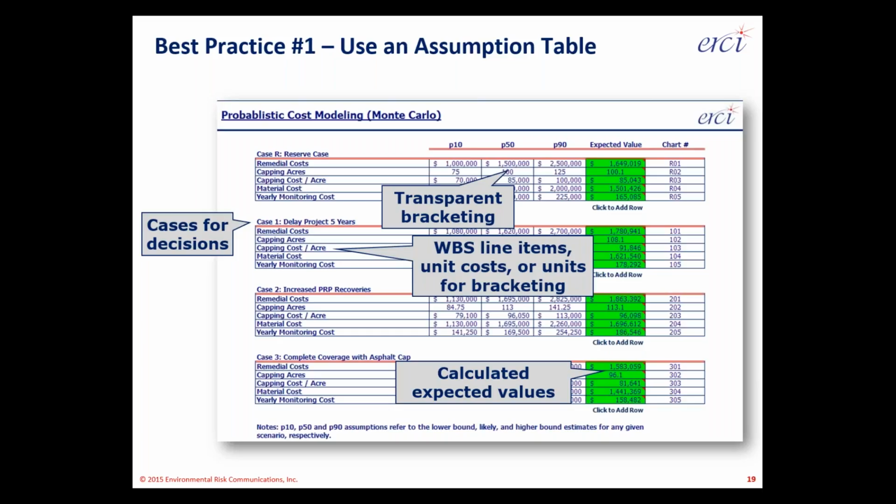But again, you're condemned to doing it again and again and again if you don't do this first part right of identifying your variables, identifying your uncertainties, and then displaying the bracketing to make your thinking process visible. You skip those 2 steps, doesn't matter how fast you do the Monte Carlo model. Doesn't matter how fast your computer is. What matters is you've set yourself up or you've avoided the need to redo this step of framing the problems, identifying the uncertainties, and bracketing those uncertainties.